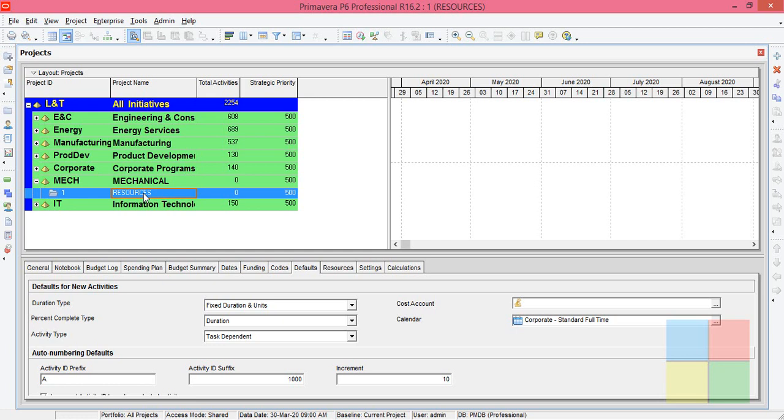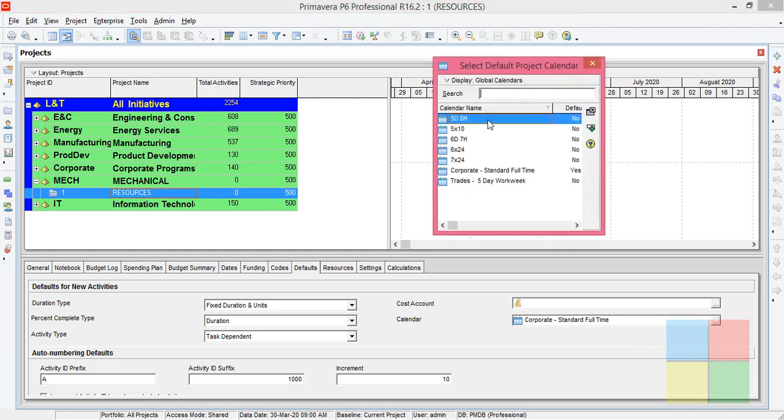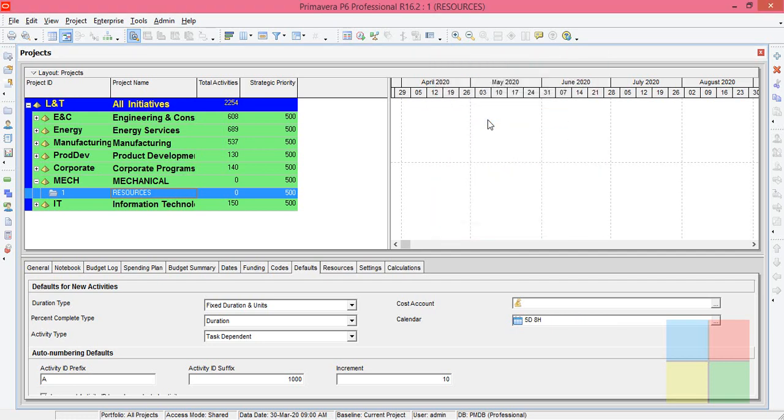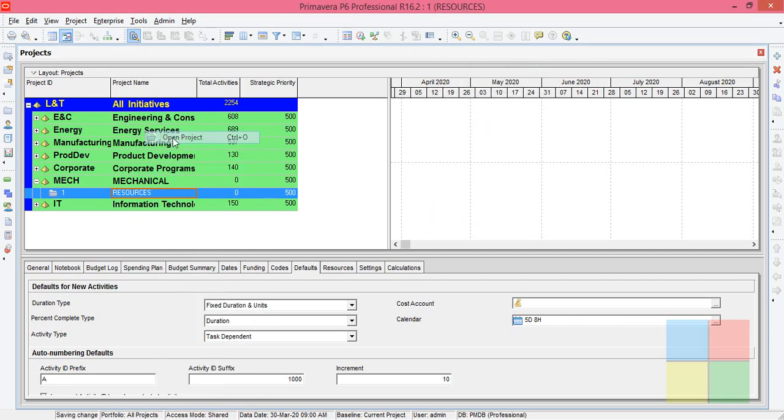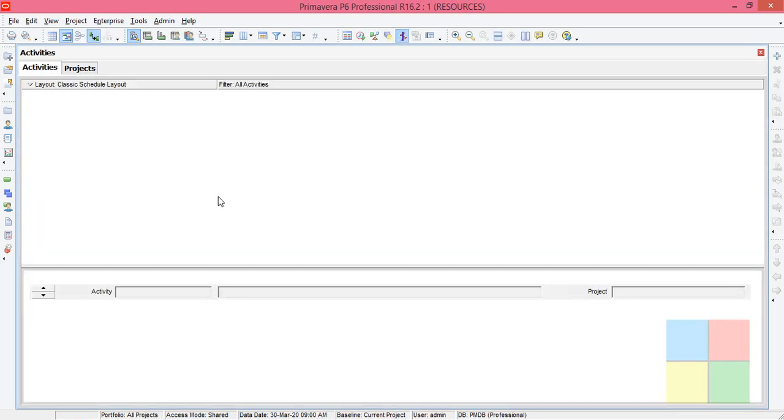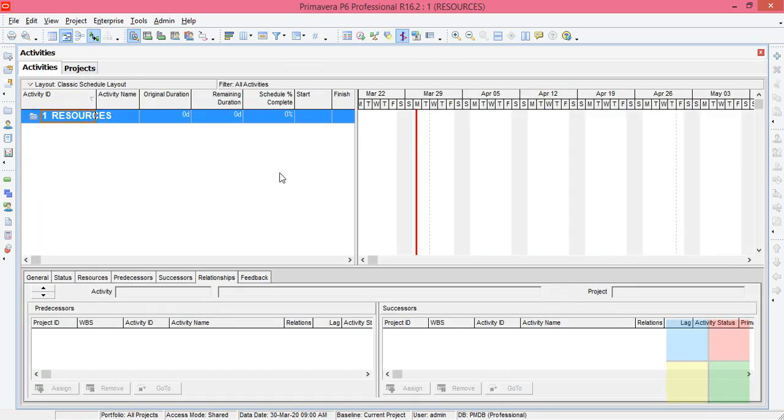Now I'll assign a calendar to this project. Highlight the project, go to defaults, go to calendar, select one calendar. I'll go with 5 day. Now right click, open the project. It goes to the activities window.